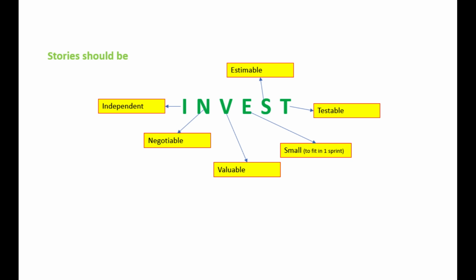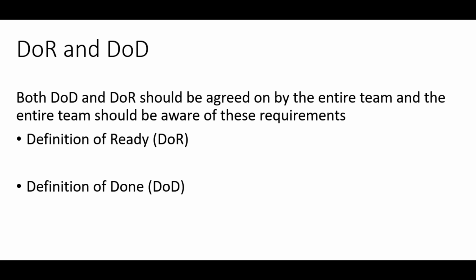Having consistency in writing user stories is crucial so that team members can comprehend the stories better. To achieve this consistency, it is advised that the team generates a reference document when they form their work approach. It's important that the team collectively generates and agrees on this reference document. This reference document normally includes the team's definition of ready and the team's definition of done.